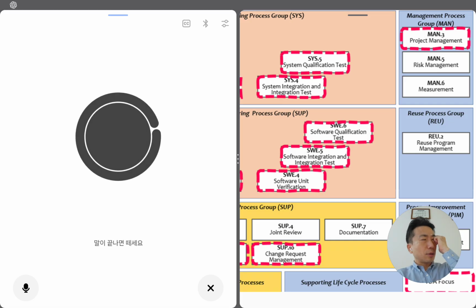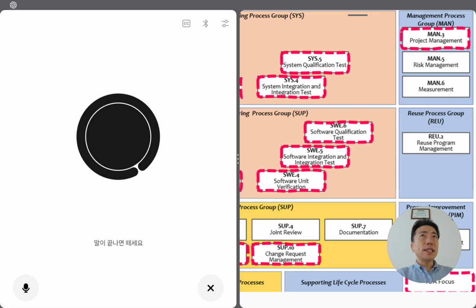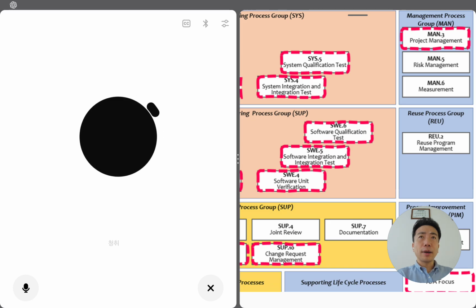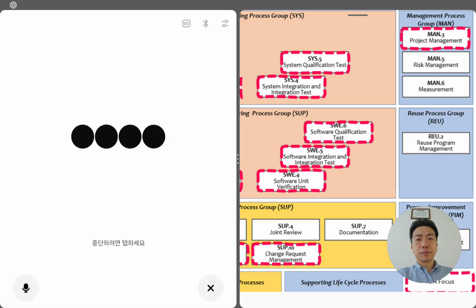So if someone wants to change something in the configuration file after the baseline, he must call up the CCB. Am I right? Almost. I think you meant CCB, not TCB. That stands for Change Control Board. So, yes, if someone wants to change anything after a baseline, they must raise a change request, CR, and get approval from the CCB. The CCB reviews what's changing, why it's needed, and how it affects cost, schedule, and quality before approving.